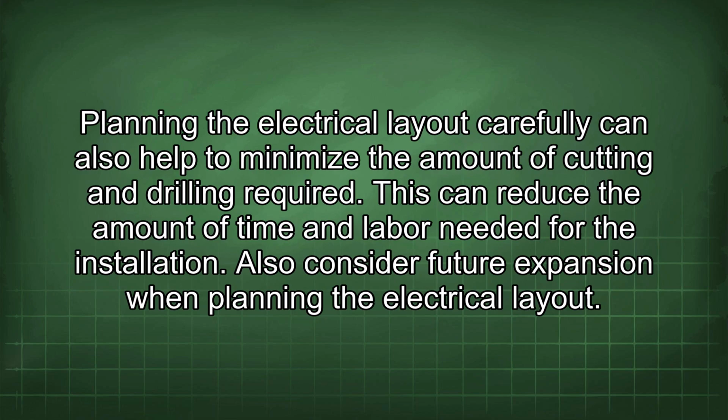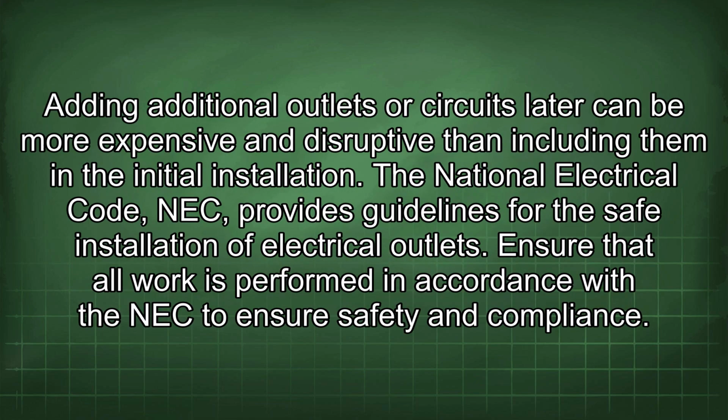Planning the electrical layout carefully can also help to minimize the amount of cutting and drilling required. This can reduce the amount of time and labor needed for the installation. Also consider future expansion when planning the electrical layout. Adding additional outlets or circuits later can be more expensive and disruptive than including them in the initial installation. The National Electrical Code, NECA, provides guidelines for the safe installation of electrical outlets. Ensure that all work is performed in accordance with the NECA to ensure safety and compliance.